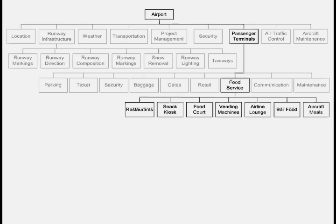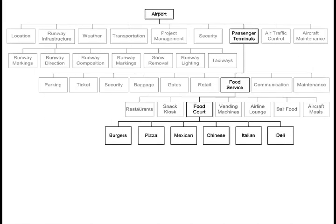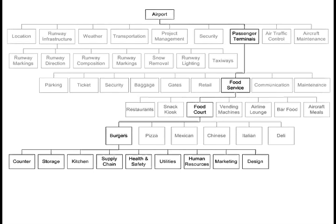And aircraft meals put on the aircraft for passengers. Decomposing the food court further, you'd have a burger place, a place serving Mexican cuisine, Chinese food, Italian restaurants, and delis. Going into the burger restaurant, we'd have the counter with cash registers, a storage area for food and utensils, the kitchen, a supply chain for bringing in food and replacing paper cups and plates, health and safety requirements, utilities like water, electricity and gas, human resources and hiring, marketing, and restaurant design.